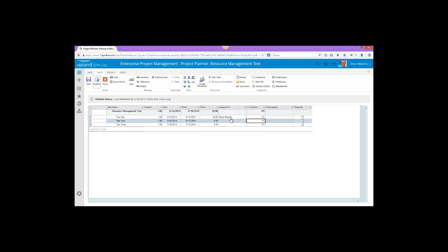They can mark tasks as complete when they finish them, which will then generate a notification back to the project manager saying, hey, they finished it, and it'll allow them to update their schedule accordingly. They can either approve or reject that, basically, and it will update the schedule for them. So you can kind of keep going through these iterations on this project schedule of people statusing the work. It comes back into the schedule. I make adjustments in my schedule. I publish it out, those types of things. And I'm going to keep going through that process.